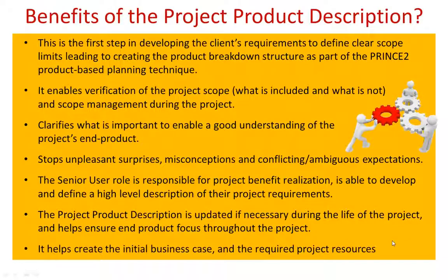It also helps to create the initial business case, because I've mentioned benefits already, and in defining exactly what the end product must be, this will help clarify and generate a realistic set of benefits for the business case. And of course, because you now know what the end product must be, it will give you a first initial idea of the required project resources. Maybe not in terms of headcount yet, because no planning has been done, but at least you know the knowledge, skills and experience, for example, of the team in order to create the end product.